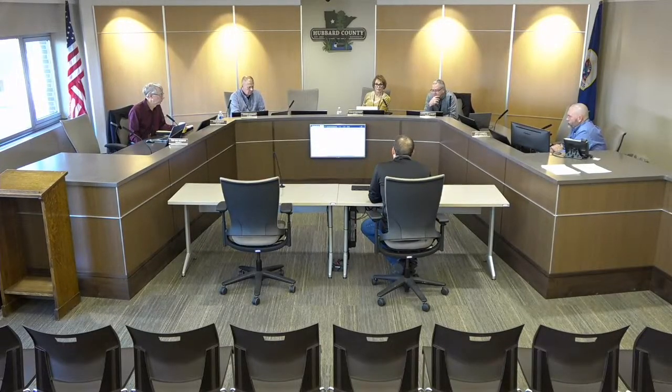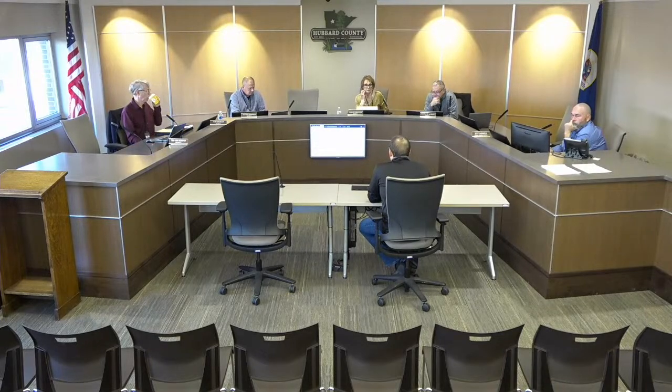The garage sally port starts in May when road restrictions are up. Lobby, records, and sheriff's is broken out in 4 phases: the additions in 2, and an office renovation in another 2, starting June 2nd and wrapping up through spring. Site work is June of '26. The housing units and booking start in late June and wrap up September of 2026. So that gives a good visual of how the project is getting laid out.